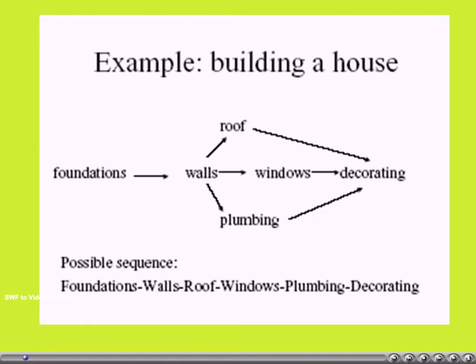But there is one more aspect you have to see. When do you decorate? After making the roof, the decoration. But before decorating, the roof has to be over. But when do you require roof? When can you do roof construction? Walls have to be completed. So like that, all the possible sequence ordering is known as the topological order. Finding out these orders is very essential in the project planning systems.